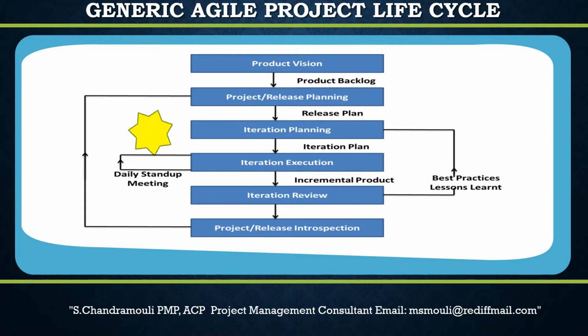The team is responsible to come up with the exhaustive list of tasks in the current sprint. The team brainstorms the tasks that they need in order to finish all the iteration stories. Some tasks will be specific to a single story, others may be useful for multiple stories. Take the opportunity to brainstorm the high-level design, or the ideas on how to develop the software during this session, without going too much into details. This sometimes brings out the perspectives that a single developer or tester would have missed during the actual software development.